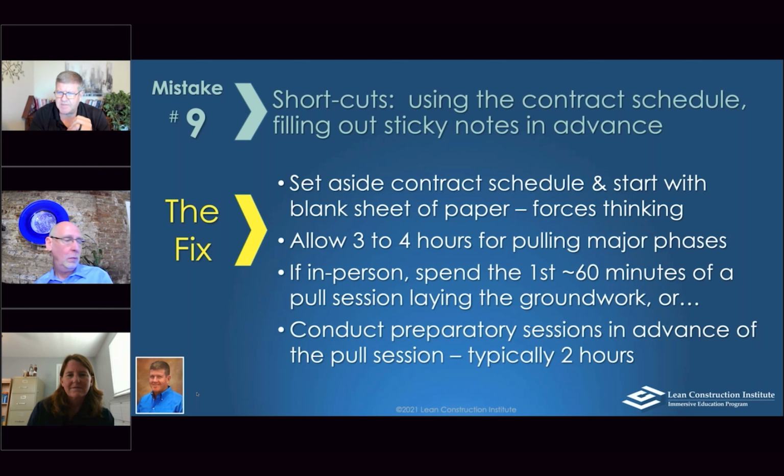Allow enough time to do it. Typically in person, it's usually 3 or 4 hours. With virtual, if we're doing some setups in advance, you can shorten that maybe to 2 to 3 hours, but generally not less than that, unless it's a very small focus scope of work.